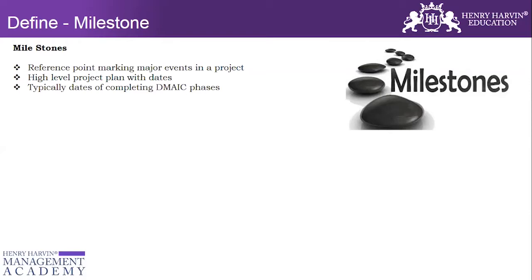Before the beginning of this define phase, I talked about the DMAIC methodology that we are going to cover. So in the milestones, we should mention the start and the end date of each and every phase. It should be aggressive but realistic. Okay, so that is the milestones in the define phase of the charter.